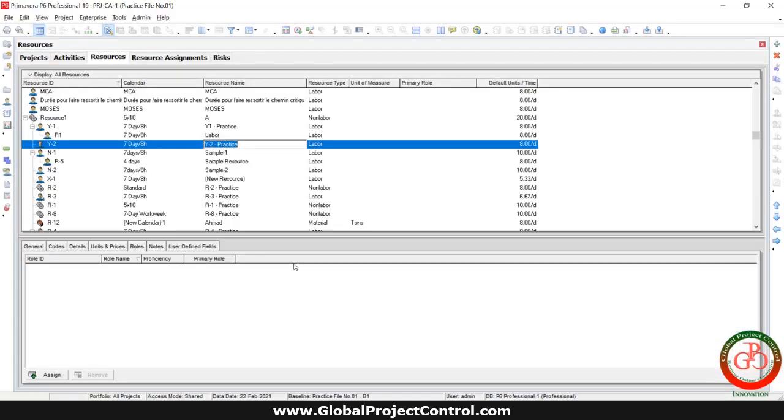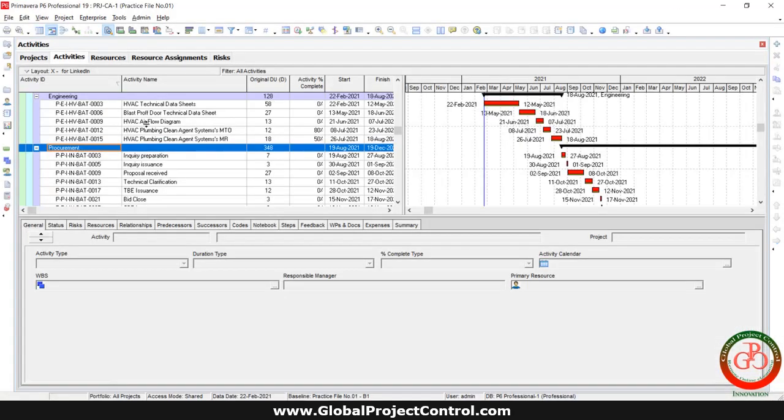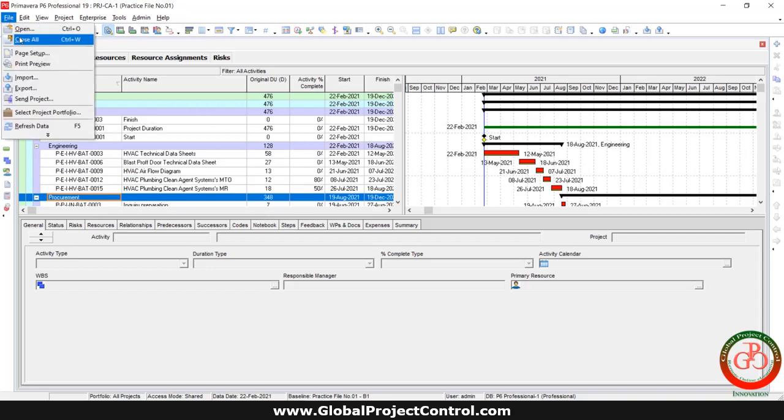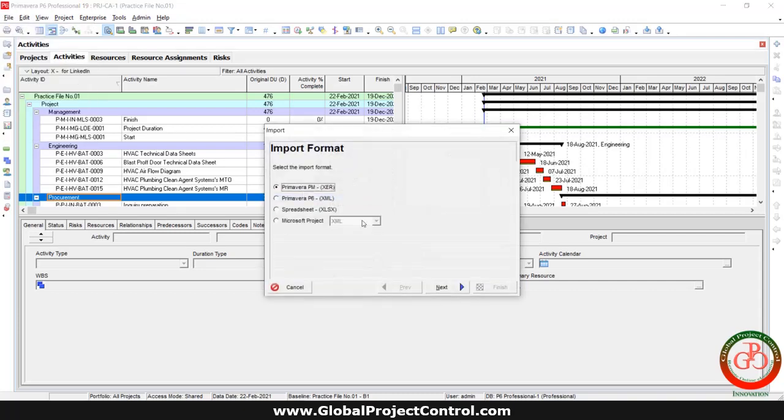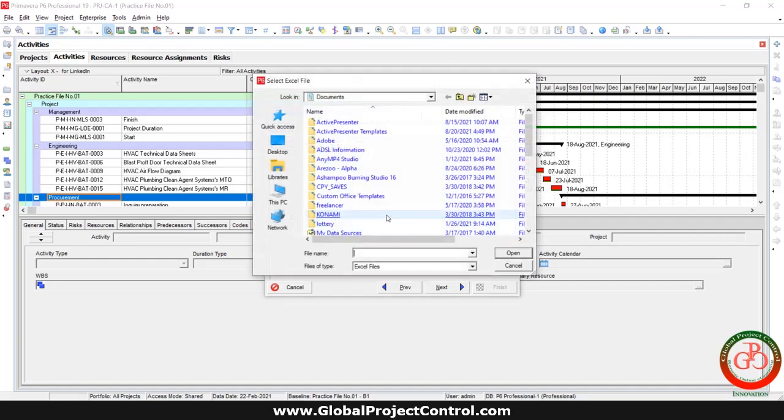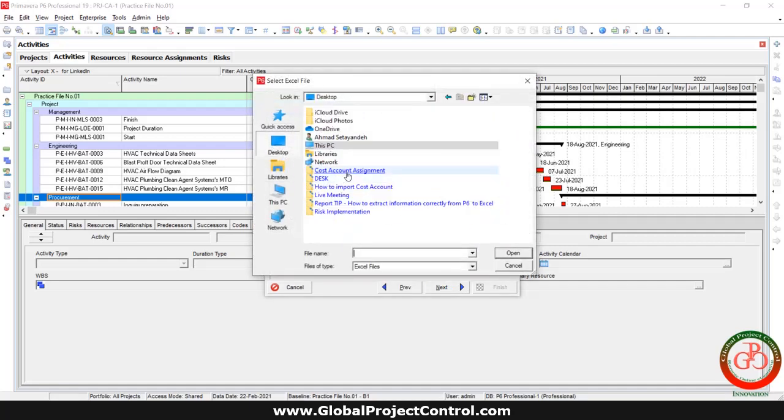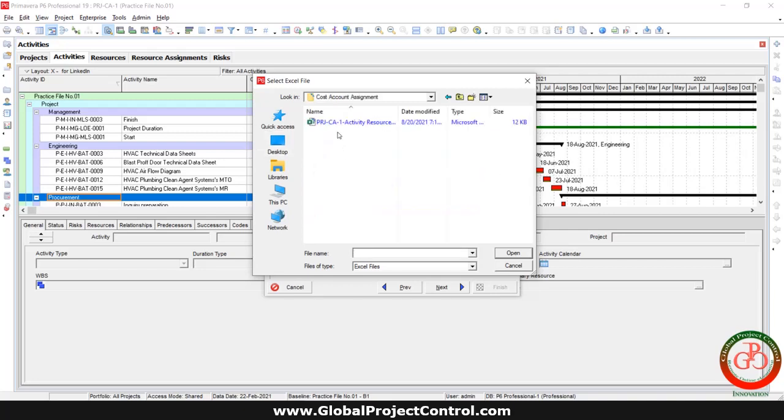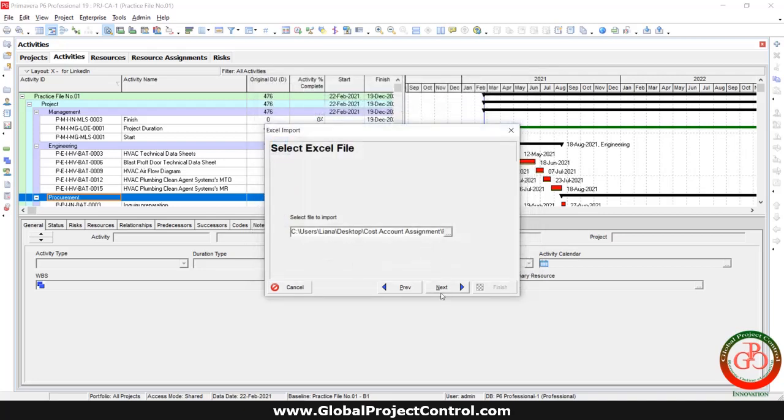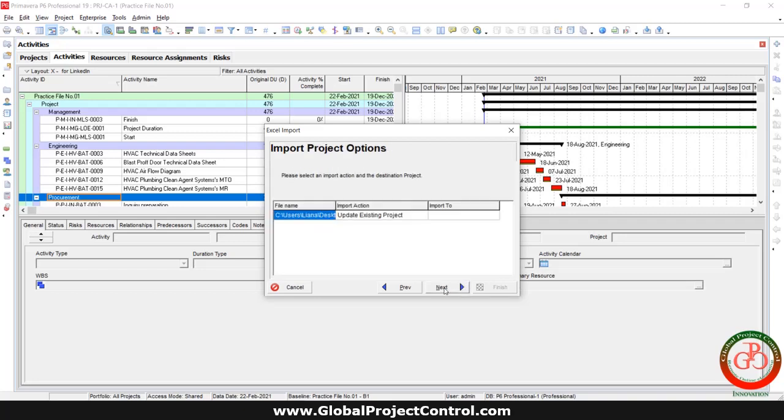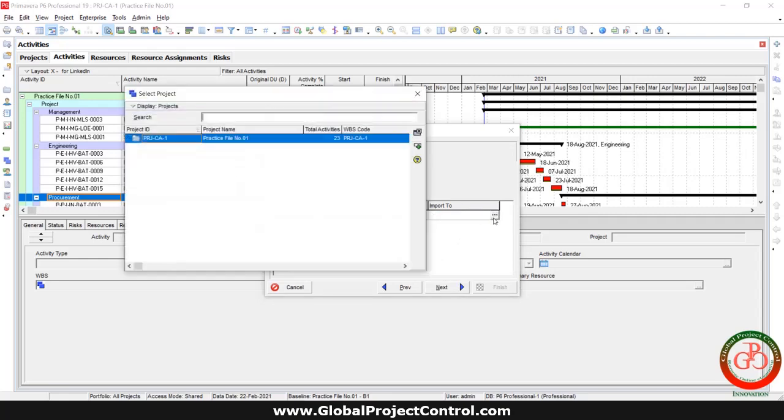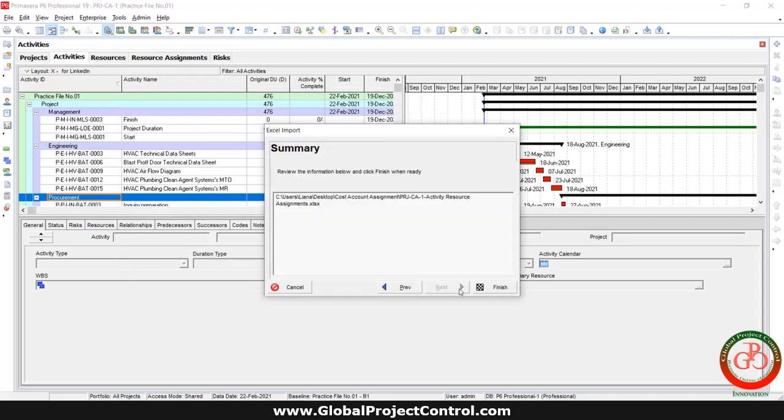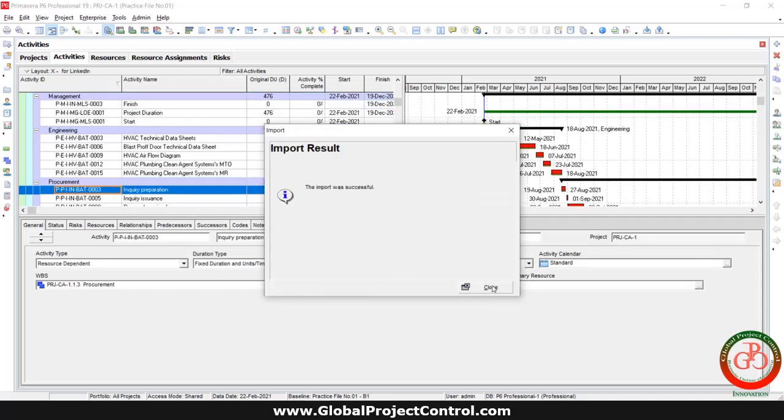Switch on the P6. Let me come back to the software and go to the file import by import for a spreadsheet. I select the cost account assignment. Select the file and select the resource assignment. In this stage, you should select the project because maybe more than one project is open already. And finish.